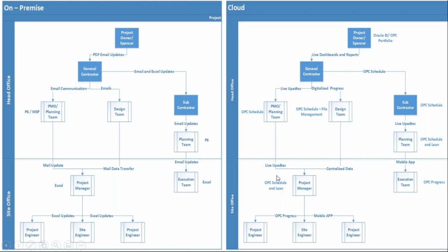This is definitely true enterprise scalability. It is going to be there. You can scale up the package now. Primavera is not limited only to the schedulers and planners. Schedulers and planners are the core responsible, as usual, no doubt about that. Whatever updates are done by the site team, they finally have to come to the scheduling team. They have to cross-check and approve it, but it's not an Excel sheet. Instead, it comes from Primavera progress so that they can review it. Once they accept it, only then can they do a rescheduling, and you can push it to compare, and they can send it to you.